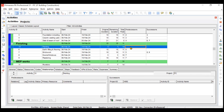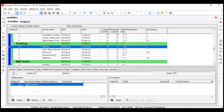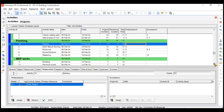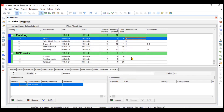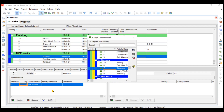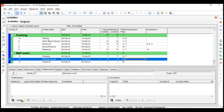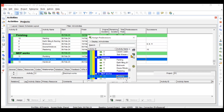Then your tenth activity has a predecessor which is activity 9 with SS relationship — click on the ninth activity, assign, select SS, and set a 7-day lag. Then the eleventh activity has a predecessor of activity 7 with FF relationship and a 3-day lag — select 7, FF, and set lag to 3 days. Your twelfth activity has activity 11 with an SS relationship — assign 11 and select start-to-start.